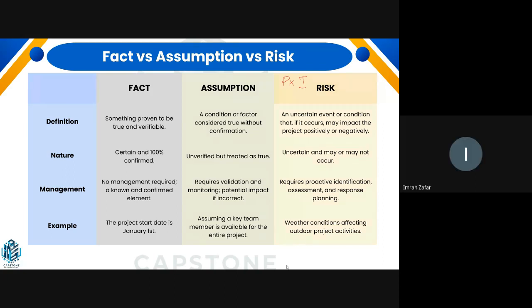Yes, very true. Obviously, if you have assumed so many things unnecessarily, or you have been very liberal in your assumptions, then obviously things can go wrong, as you have mentioned. But assumptions should be something for which you take help from your OPAs. You have the assumption list from similar previous projects.